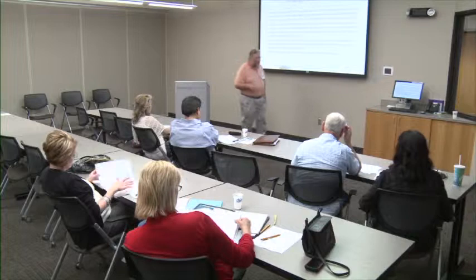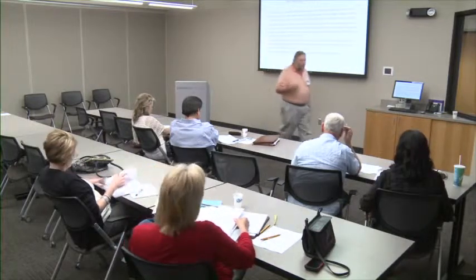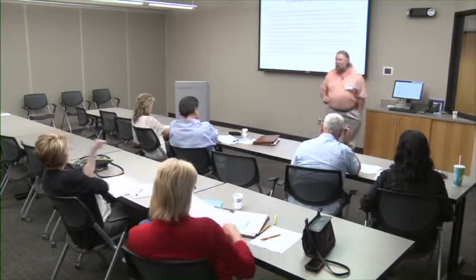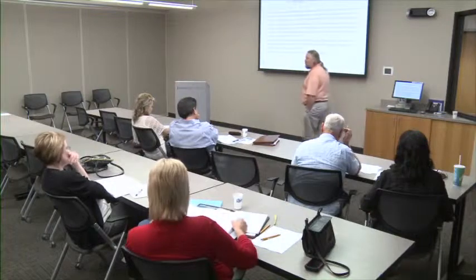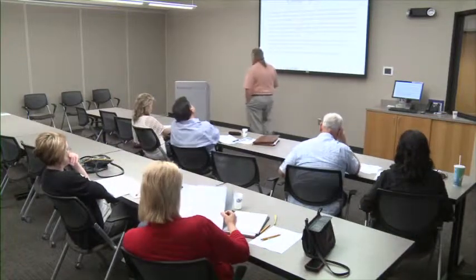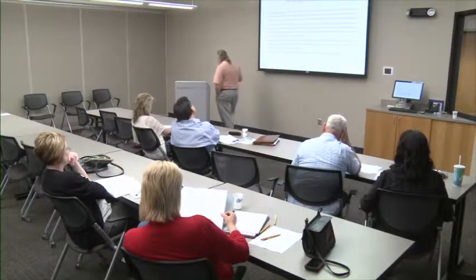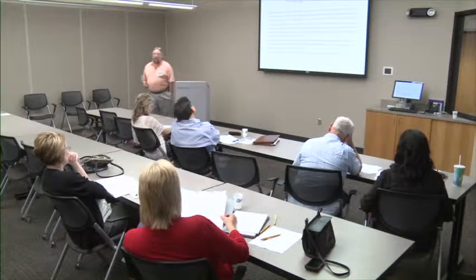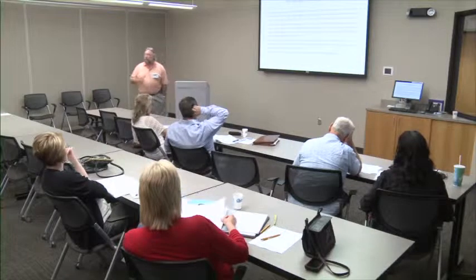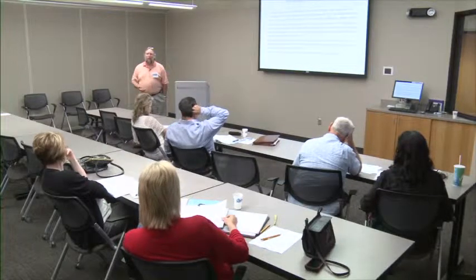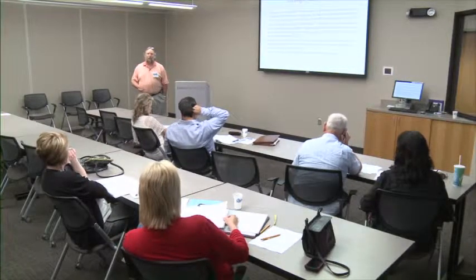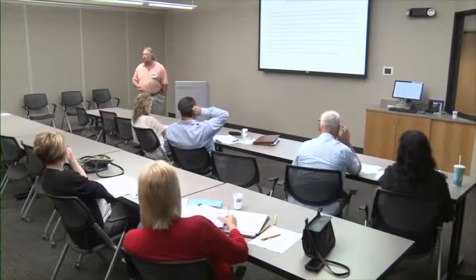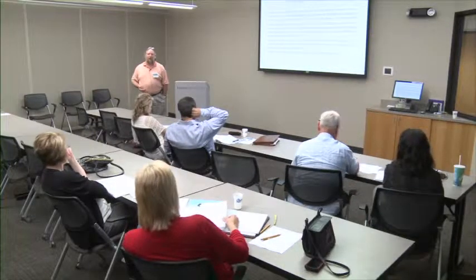The biggest problem we need to look at when it comes to contracts, and where most disputes revolve, is the change condition clause. Almost all contracts state someplace that you have actually read the contract and you understand its conditions. So you can't very well say, well, I didn't know I was supposed to do that. That's not a change condition, that's ignorance.